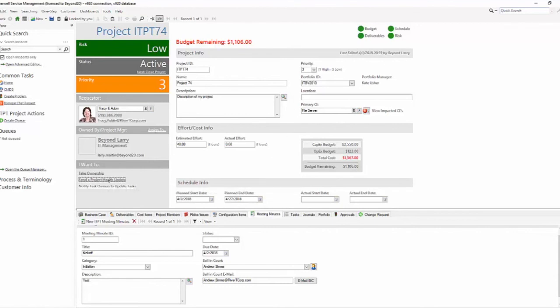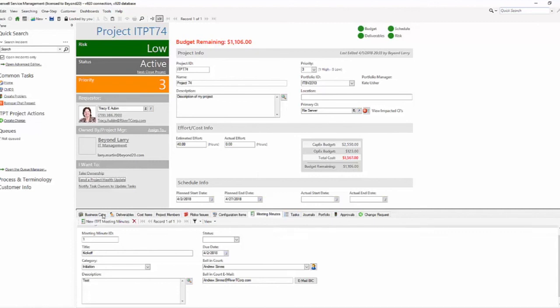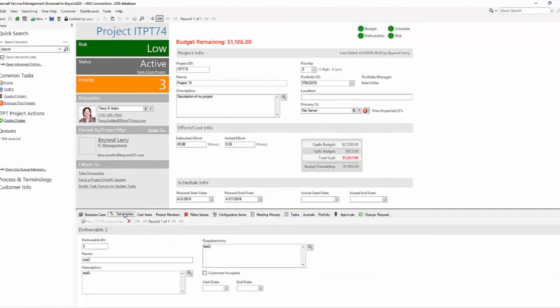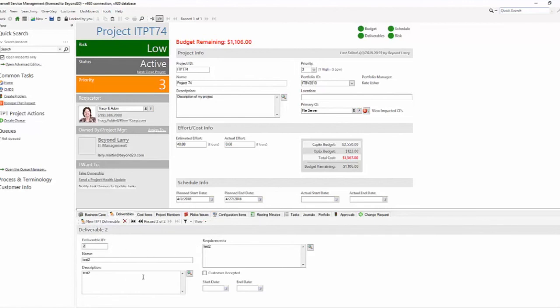I would consider, if you didn't want to put the automation in, I would consider turning this into a branching one-step and renaming that to be update or notify about project health so that you can run the same one-step and update your project health manually and or send an email. Yes, you can walk through and just cancel the email portion, but that's not as clean looking or feeling as just going in and rebuilding this one-step. You can notify your task owners that they need to create or update their tasks because you're in the middle of doing a project update. You can track your business case, your deliverables.